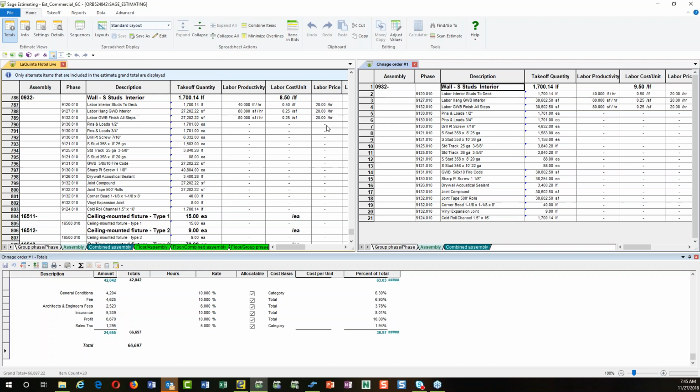And I wasn't too complicated on that. It's really not that hard at all, but there's half a dozen ways to deal with change orders. And then when I send this back over, if I keep it as a separate estimate, I can actually have this go to accounting, transfer this over as a change order. And it will go and reconcile in accounting as a change order, so you can track it as a separate change order. Hopefully that'll answer your question.